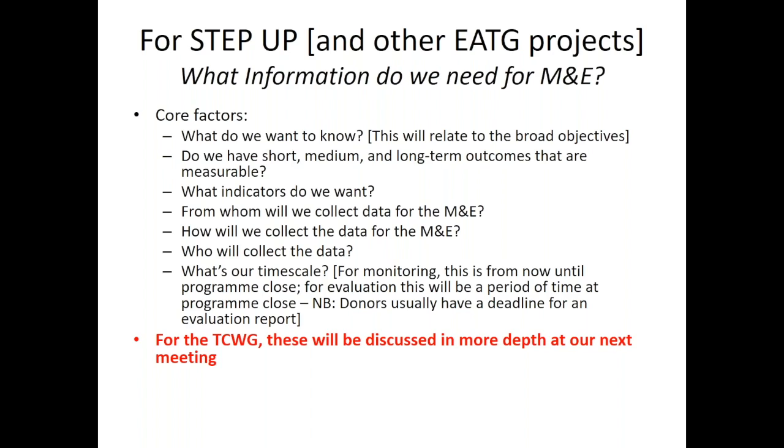And then how will we collect the data? What tools do we use? Do we use interviews, questionnaires? Do we use other more intangible things like social media conversations? Do we look at policy documents? And this should all be stated in the framework. So when a project is set up, or when M&E for a project is being planned, this should all be set up right at the beginning, so you can then hit the ground running. And who will collect the data, obviously? And what's the time scale?